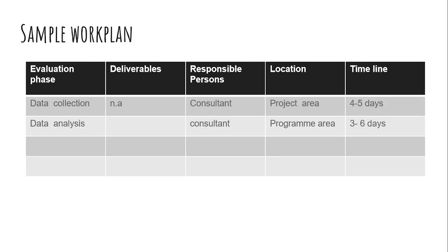And this is the sample work plan. As I said, one, you have the evaluation phase, maybe data collection, deliverables. Who will be responsible is the consultant. Where is the data collection going to be done? In the project area. What's the timeline? It could be 4 to 5 days. Data analysis, who will be responsible, the time, location, the deliverables, and the timeline. So that's just a sample template for your work plan for the project, for your Inception Report, evaluation Inception Report.